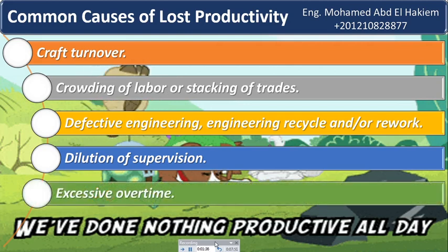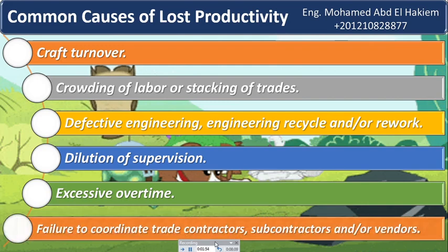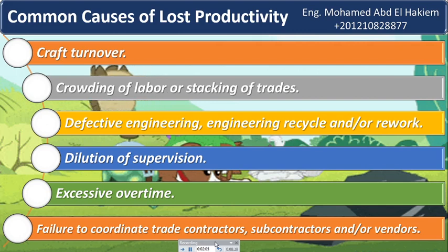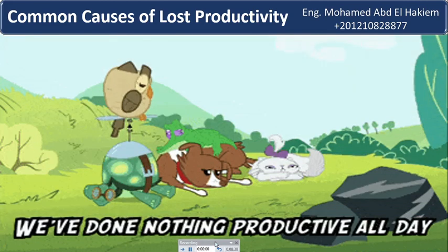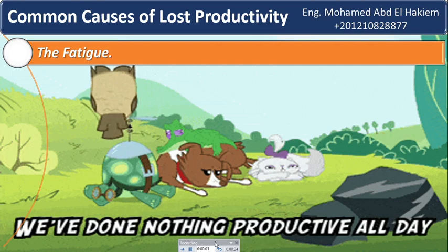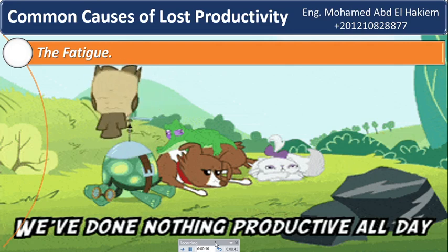Eleven: excessive overtime. Productivity typically declines as overtime work continues. The most commonly stated reasons include fatigue, decreased morale, poor workmanship resulting in higher than normal rework, and increased accidents. Twelve: failure to coordinate trade contractors, subcontractors, and/or vendors. If the project management team fails to get subcontractors, material, or equipment to the right place at the right time, productivity may decline as crews will not have the necessary resources to accomplish their work. Thirteen: fatigue. Craftsmen who are tired tend to slow down, make more mistakes than normal, and suffer more accidents and injuries, decreasing productivity for the entire crew.